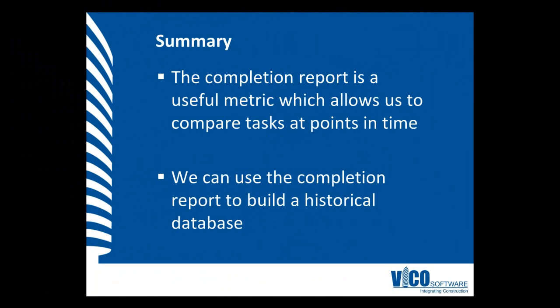The completion report is a useful metric which allows us to compare tasks at a point in time. We can use the completion report to build a historical database to understand how a project behaved. We can use these production and consumption values to estimate and to build future project schedules.